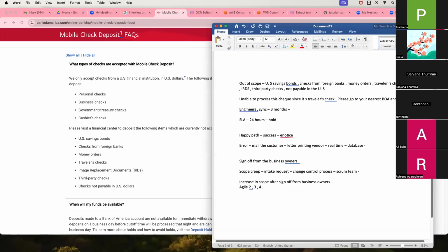No, they don't. They will tell you the essential functionality, but from a user story level, you will design. For example, login functionality. They say that login has to go first, that it is high priority, right? That is essential. So they'll give you an idea, but from a functionality level, your developer will say, because if your functionality has some dependency on other things, then that cannot go live. You got it? So they'll give some idea, but from a technical perspective, whether that can go live first or not, your developer will be able to say it.